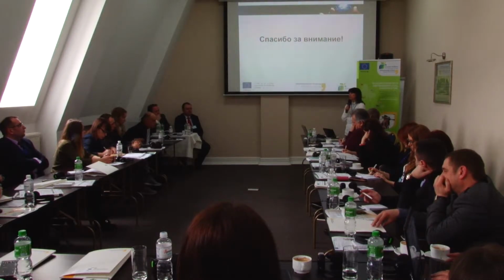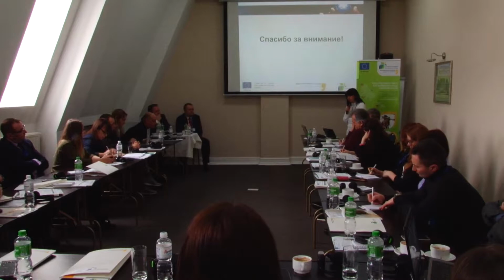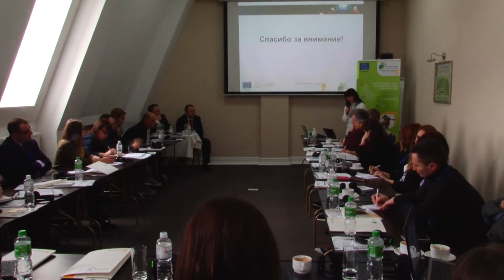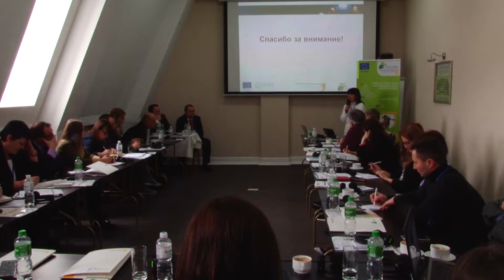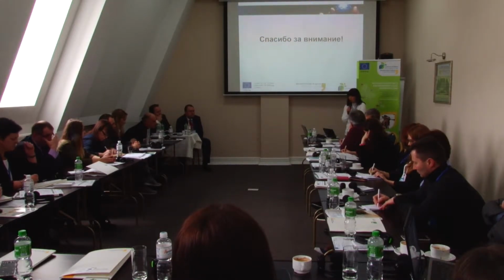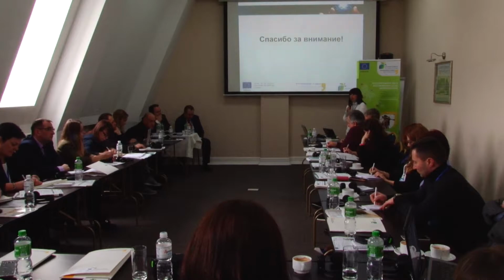The designer will have to provide the drawings, which you will place in your systems according to which the procurement will be done. He must also provide explanatory notes and technical specification for procurement of works, and these documents must include both materials and works.